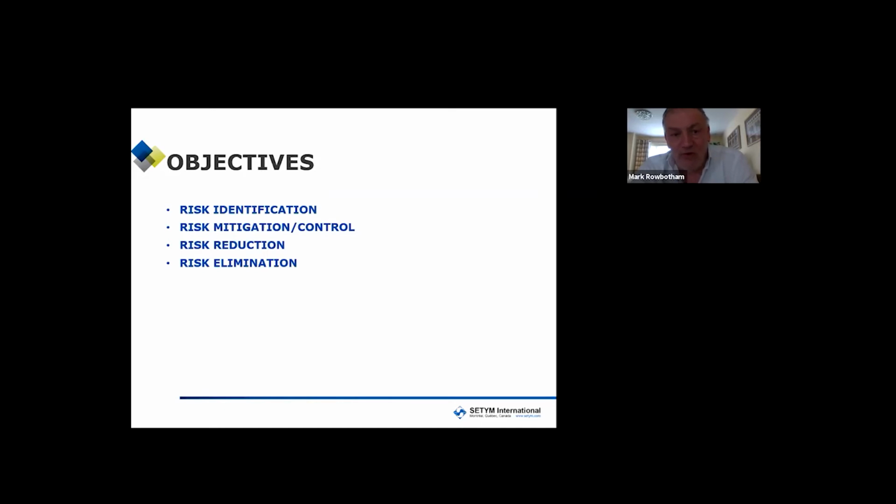Then comes risk mitigation and control. In other words, remedial action that reduces the potential risk, in other words, the raw risk that I talked about, to what we call residual risk, which is the resulting risk after we have taken action.